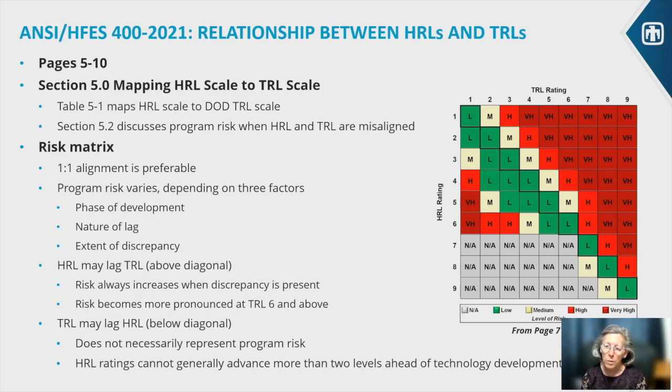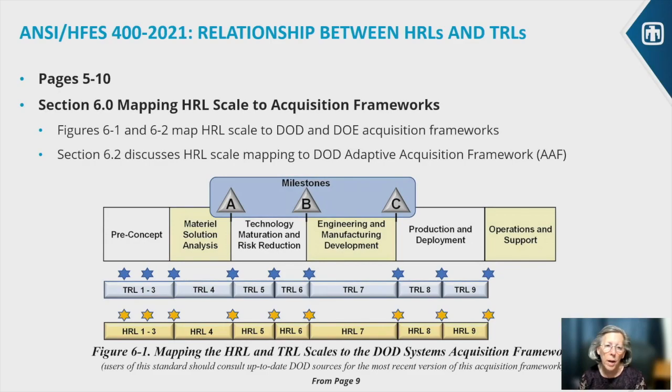And it has implications for the cost, the schedule, the quality, etc. And you can also use it to emphasize, if we look at it early, before we've really gotten a hard design, we can make changes. If we wait until the design is set, then nobody ever wants to change it because the cost is going to be prohibitive. So this is one of the mappings to the DoD acquisition framework.